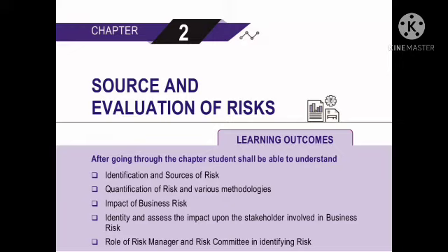This, typically, involves any of the myriad of everyday business decisions. This involves addressing the root cause of the risk factor. 3. Transfer/share: reducing the risk likelihood or impact by transferring or, otherwise, sharing a portion of the risk. Common techniques include purchasing insurance cover, outsourcing activities, engaging in hedging transactions. 4. Accept: no action is taken to affect the risk likelihood or impact. This is mainly in cases where the risk implications are lower than the company's risk appetite levels.